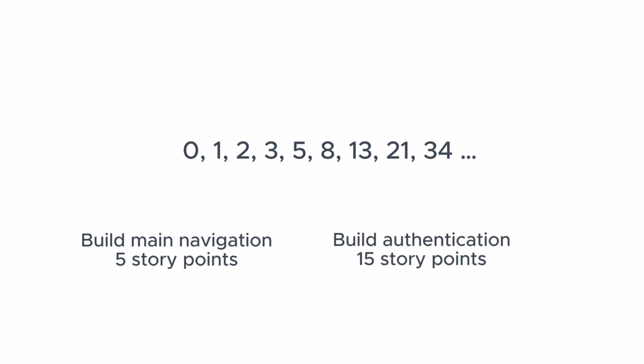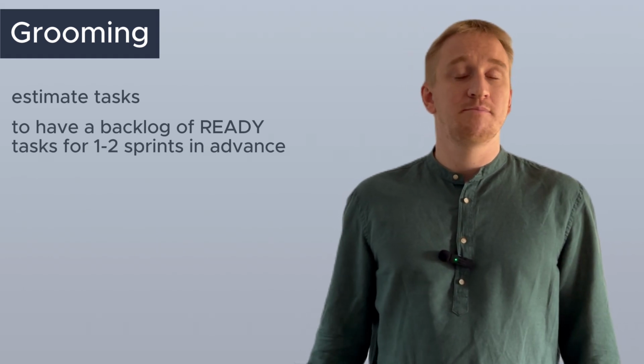Story points are an abstract value you as a team agree to use. Estimation is always based on the complexity of tasks compared to each other. For example, as a starting point, you agree that building a page slider is going to take 3 story points. You as a team can just guess, as you need to have a starting point. Then, when you estimate the second task, you need to compare the complexity based on the already estimated task. For example, as a second task, you're going to integrate a payment module. You understand that it's 5 times more complex compared to the slider task. Then it's going to be 15 story points, and so on.